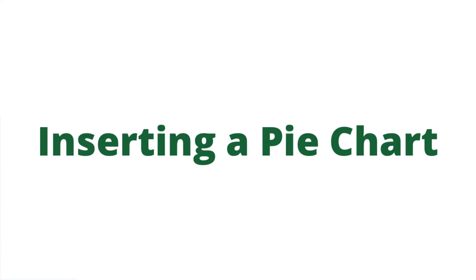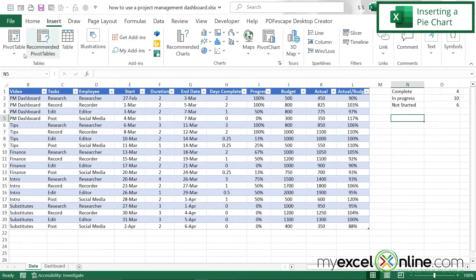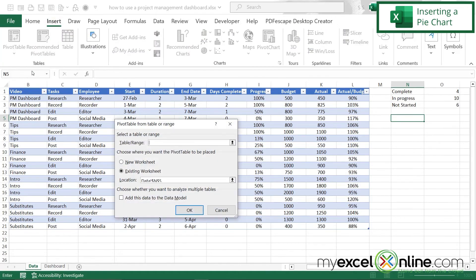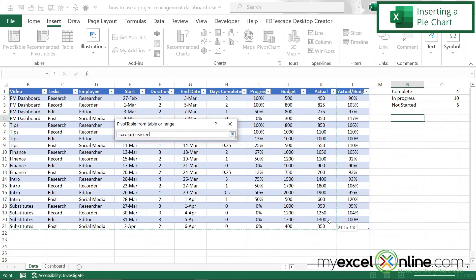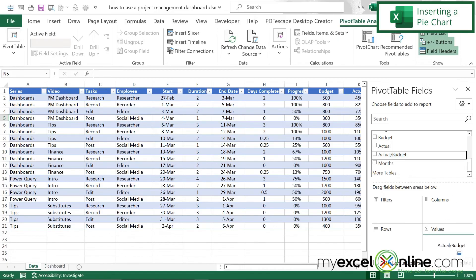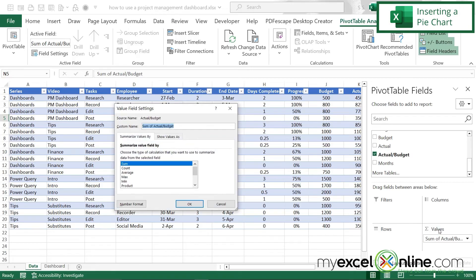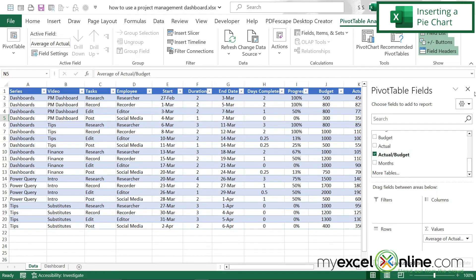Now let's go back and create one more pivot table to base a graph on, but keep it off the dashboard. I'll go to Insert, Pivot Table from table range, click the up arrow, select my table, click the button again and say OK. I'll take the Actual Over Budget field, go to Value Field Settings, and change it to Average so I can see the average actual-over-budget percentage. Clicking OK and closing, I can see I'm doing pretty well — just a little over 100%.